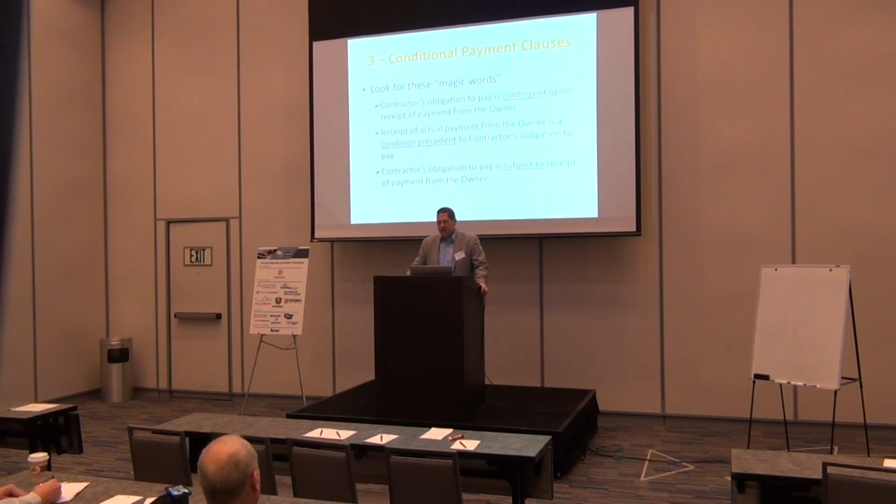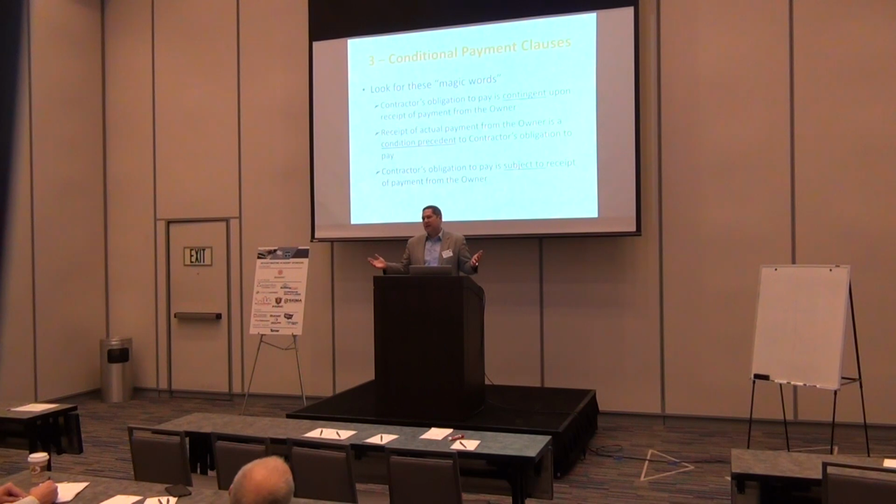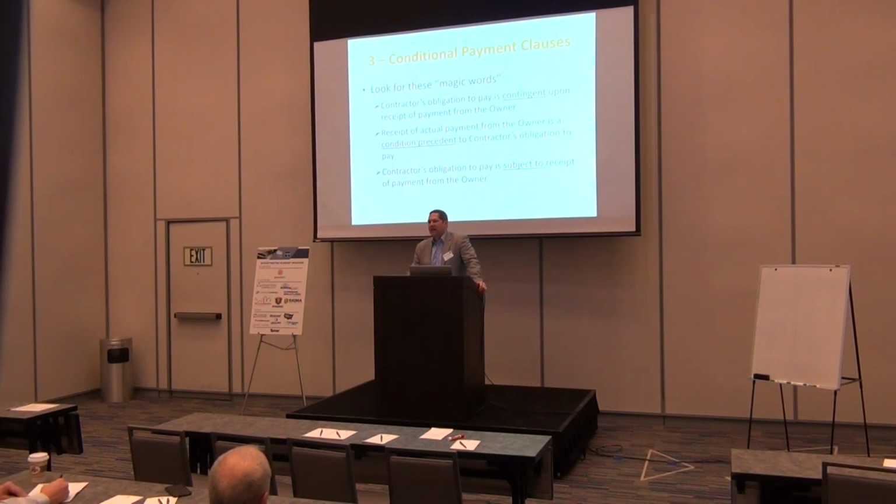Another way I've seen it phrased is that the contractor's obligation to pay is subject to receipt of payment from the owner. So if those kind of words are in there, it might say that the subcontractor bears the risk of non-payment or something like that. What that means is, if the owner shuts down the project and doesn't pay the general contractor, and you think that the general contractor ought to pay you, then you may lose if you have that kind of language in your contract.